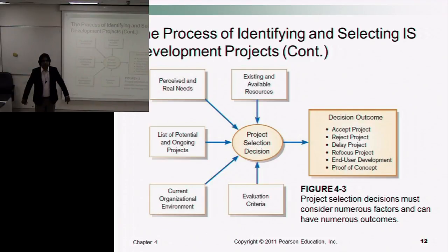So what we did in the beginning, we identified different projects. Then this identification may be based on two different approaches, either top down or from bottom up. Those identified by the top management are larger in scope and may be longer in duration. Because they have a wider vision, they are more widely applicable.